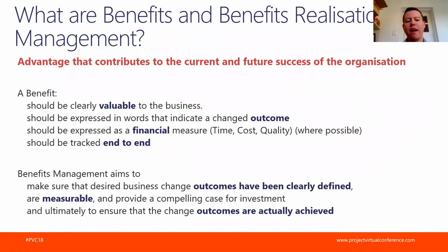Then you break this down into what is achievable and what needs to be done to get to that benefit. And as I said, it has to be financially measured. So you have to say, if I manage to get 10% more people, I will get X $1,000 more on my revenue on a monthly basis, for example. So this is a benefit.